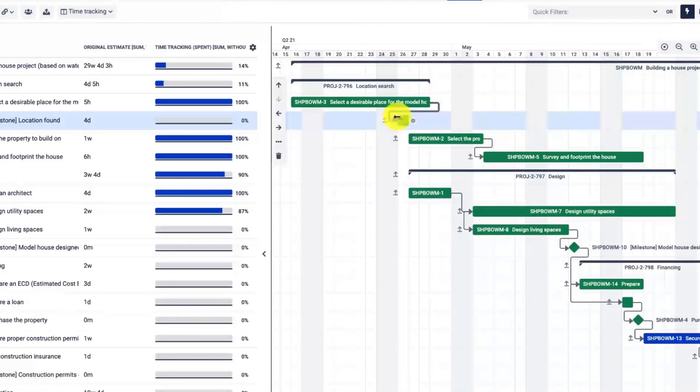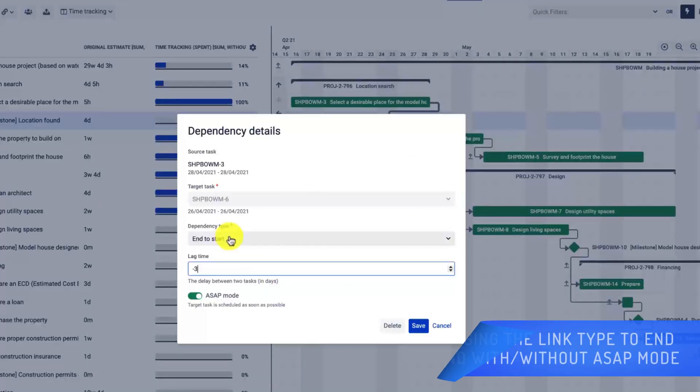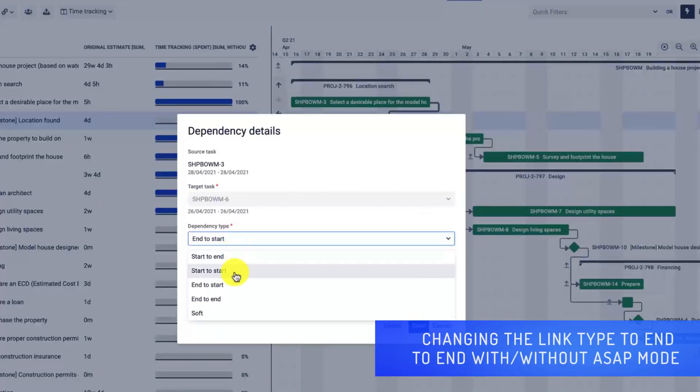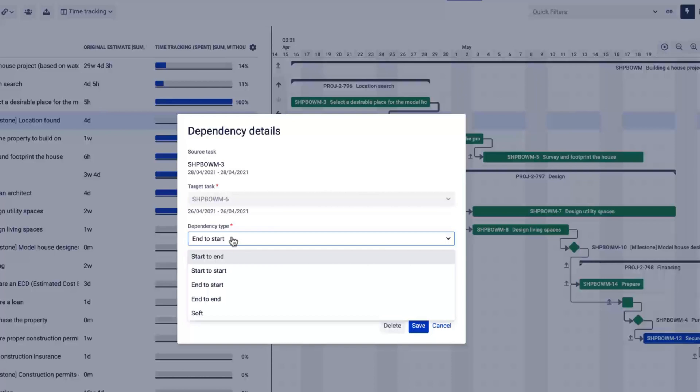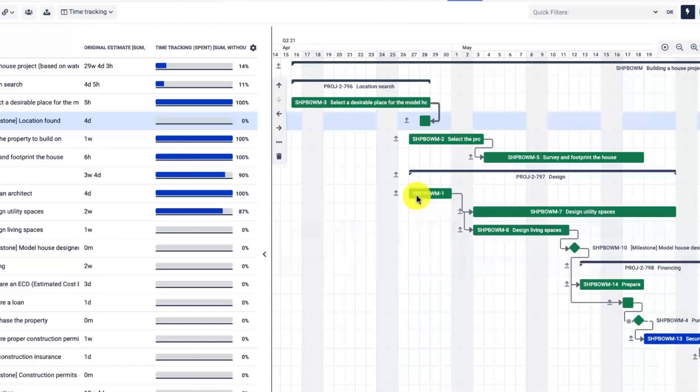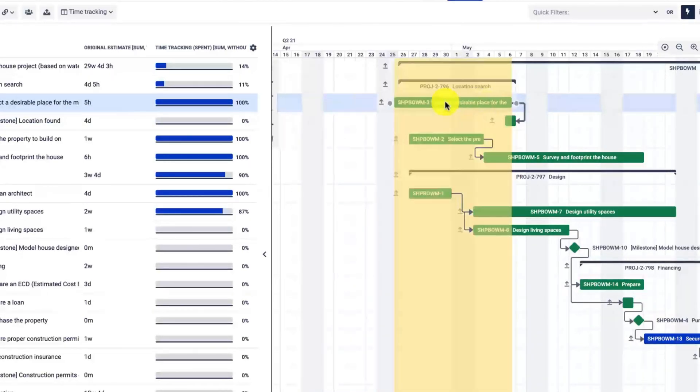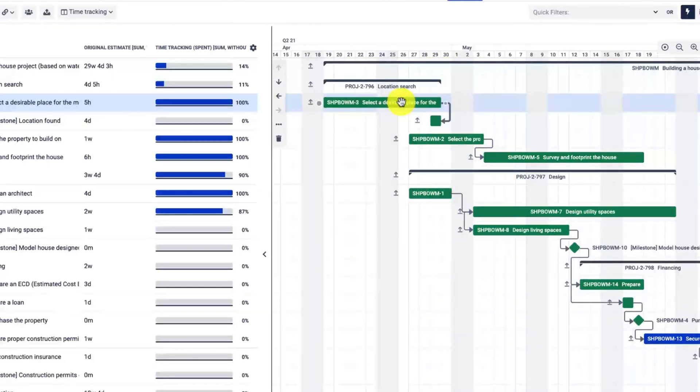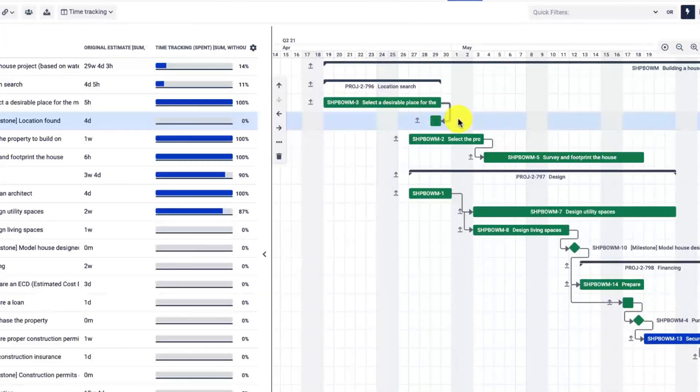Now you can change the link type. As you can see, there are five options to pick from. I will select the end-to-end. These are pretty standard to those familiar with Microsoft Project or other Gantt chart tools. There's one additional link referred to as soft, which I will discuss later. Let's change the link. As you can see, right now whenever I drag and drop the tasks, they behave differently—the successor has to end on the same date as the predecessor.